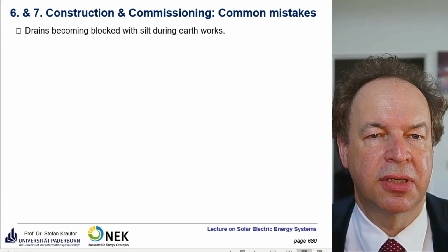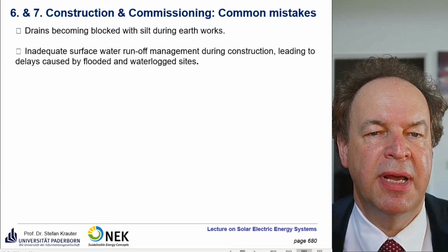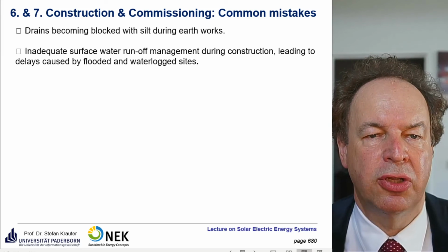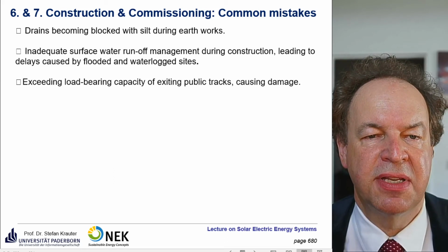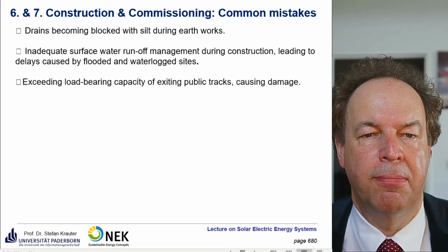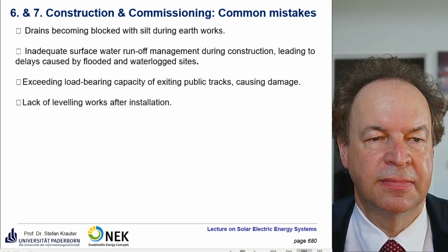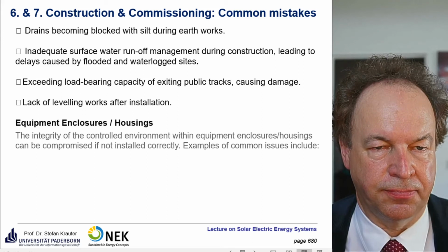Drains becoming blocked. Yes, this was mentioned before. And inadequate surface water runoff management during construction, leading to delays caused by flooded or waterlogged sites. Excessive load on the bearing capacity of existing public tracks, causing damage. Lack of leveling works after installation.